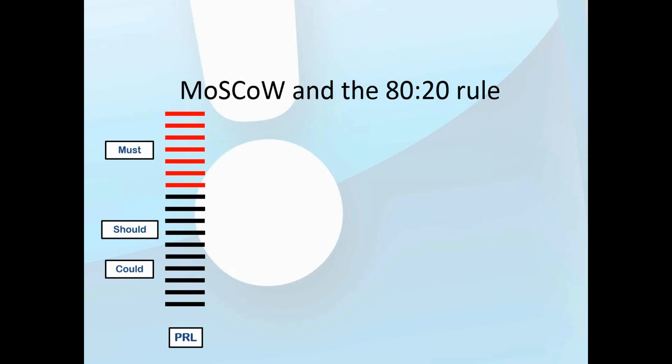Now, as you start going through the project and you're playing around with things and things go a little bit wrong, a bit like a couple of things that have happened on this project already, you might de-scope things and drop things out to keep your eye on that deadline and to keep your quality threshold at the right level. So what you do is you drop things out as you go along. You de-scope. Maybe a few things. So if this is the original requirements list and we drop a couple of things out, these become won'ts, or won't have this time.